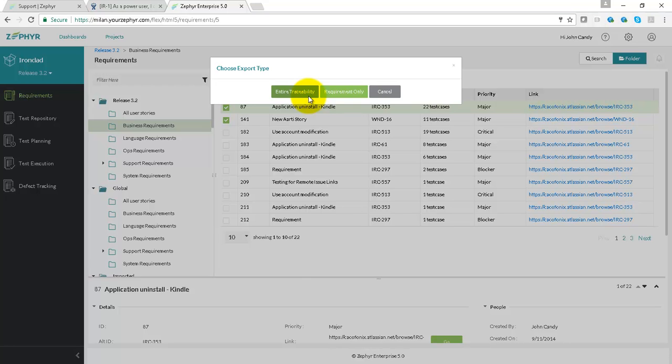then the traceability report will show you all of your user stories, epics, new features, your requirements from Jira connected to test cases in Zephyr, cycle and phase information in Zephyr, execution data in Zephyr, and also then your defect information from Jira in one consolidated report, which can be in a variety of formats.